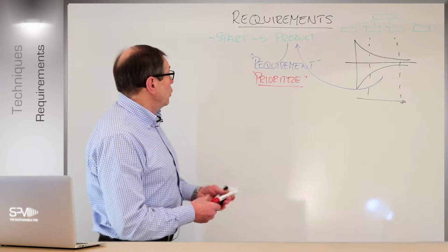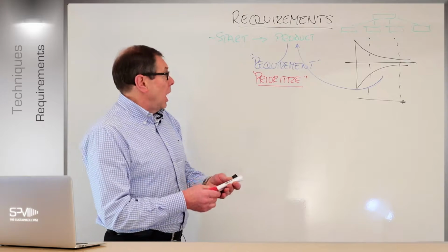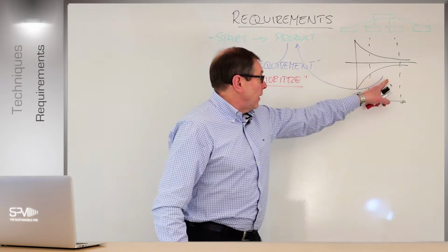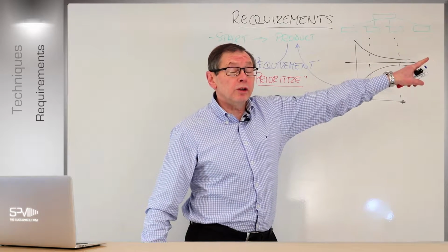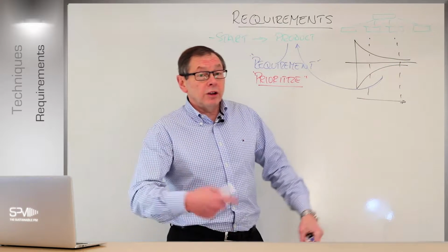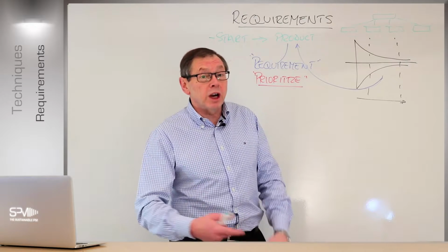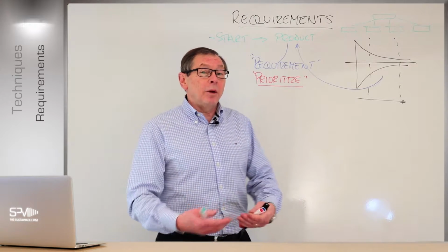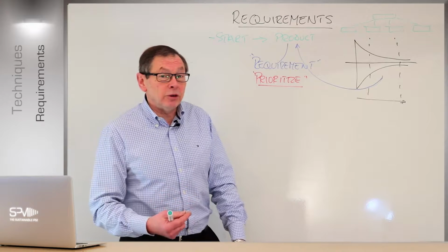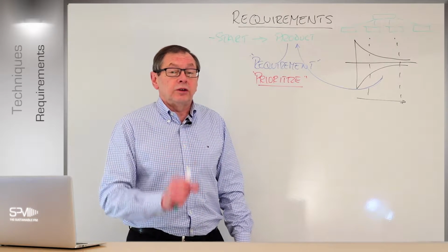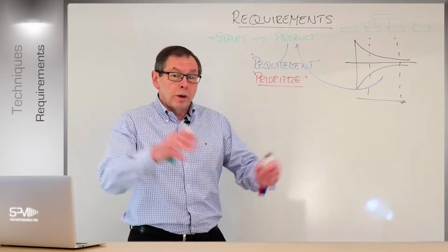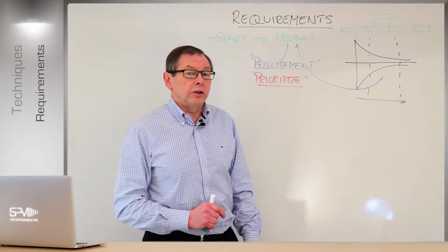Now, normally when we get to that, we start to understand a lot more about that. But of course, remember, it's only a first cut in this particular phase. As we go through the project and start delivering, prioritization and products and scope would therefore change as well, right? And it's just how we handle that change. Main thing to understand, if anything's got to be changed, it needs the right authority to sign it off. Okay, we'll look a bit more about that when we look at prioritization.